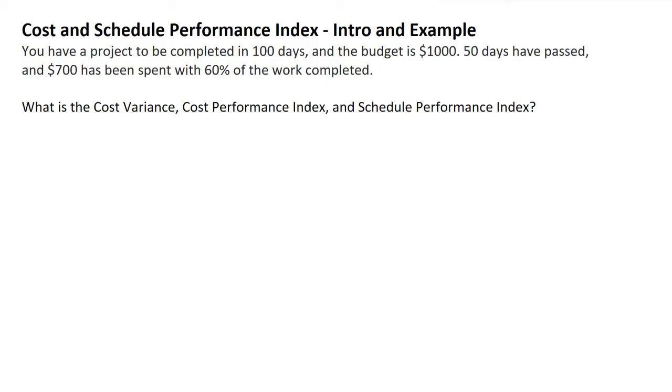In this scenario, we are a project manager and our project is expected to last 100 days. We've been given a budget of $1,000 for this project and so far we're at day 50 and we've spent $700 with 60% of the work completed.